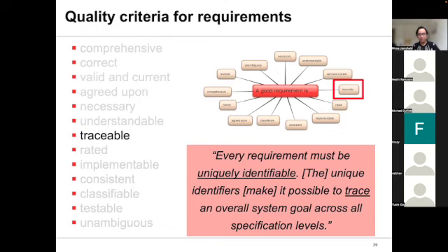So they understand that this ID number we have to incorporate in the system, and even for the testers. As part of your software company, the ID that is attached to the requirement at the beginning of the elicitation phase is going to carry through all the analysis, the specification, the validation part, the testing of it. So traceability, again, is a very important criteria for requirements.